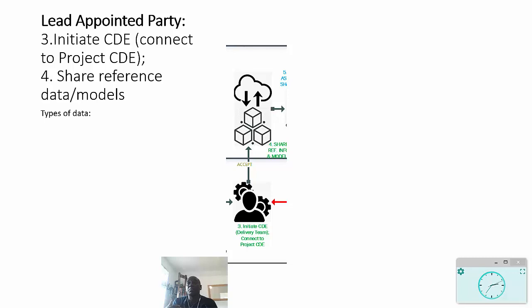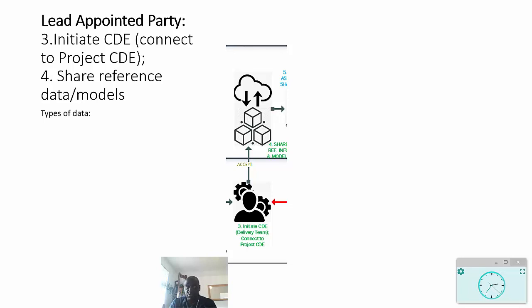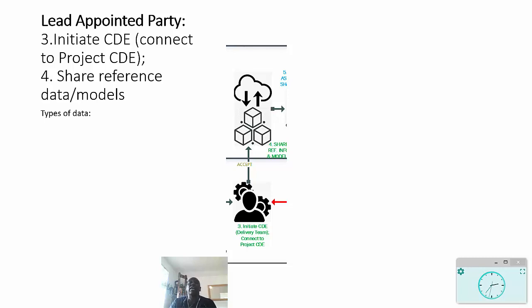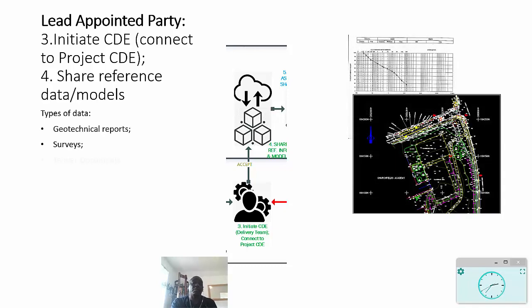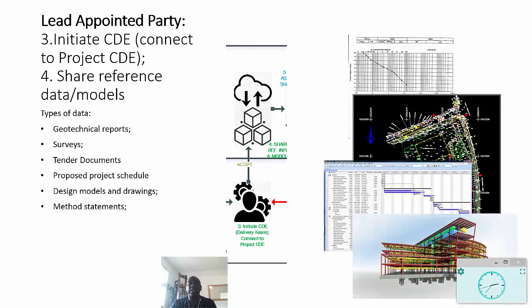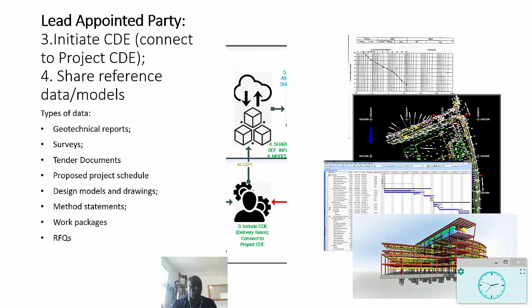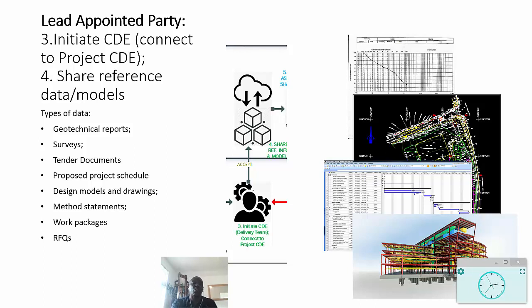The lead appointed party has the role of initiating and administering the common data environment. Now one of the key aspects of this is that there is probably a project common data environment which is being administered by the appointing party, and so there must be a connection between those two, and that needs to be tested. It's through that environment that the reference information, including models, needs to be shared. The kind of data that we're talking about could be geotechnical reports, surveys, tender documentation, proposed project schedule, method statements, work packages, requests for quotes, and design models and drawings.